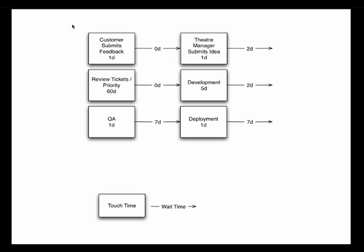This is a value stream map I did at a presentation in Dallas for a company that does software for movie theaters. It shows a couple of interesting things. 'Review tickets priority' — that probably should be aligned. But it seems like wait time — 60 days. By doing a value stream map, we can see we have this 60-day wait time on reviewing prioritized tickets, and maybe we can eliminate some of that time.